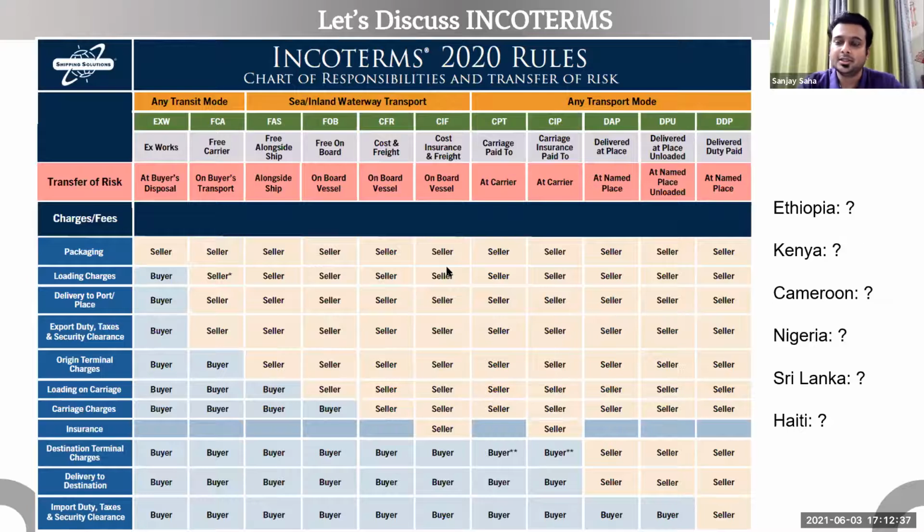Okay. The reason for this quiz was just to show you that with Incoterms, if you are not familiar with them, you really need to understand the costs, who pays, who doesn't pay, the risk, and at what point. That's very important. The second question was who bears the risk. In DAP, the risk while in transit is borne by the seller, and most of you got it right here. Ten people said it's the supplier, and it is right.